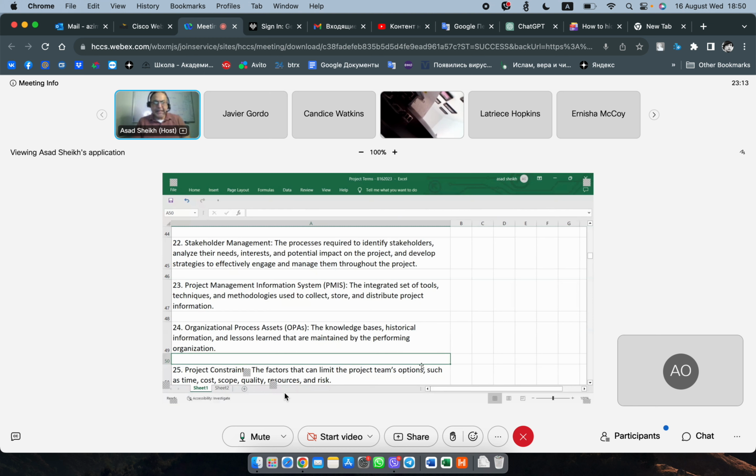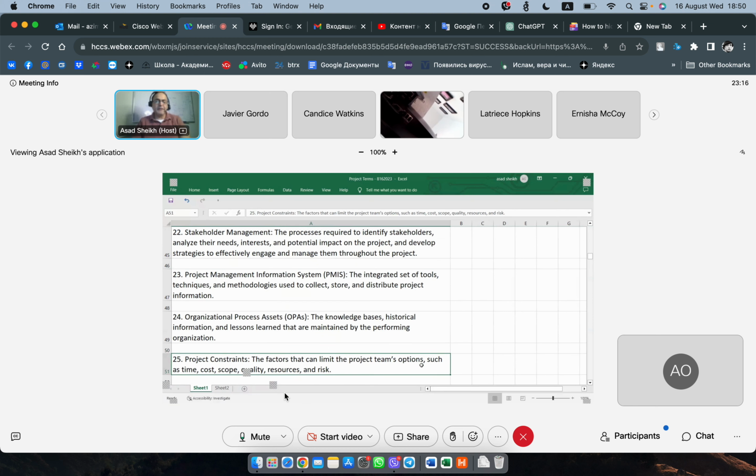All right. Organization process assets. This used to be in PMBOK 6. They would call all of these assets, for example, your lessons learned, your plans from other projects, all the documentation, all the archive documentation, all of those things constitute what they call organizational process assets, OPA. You may not get a question asking you about OPAs, but you will get a question about, what do you do with these documents? These are your assets, these are documents, and you use those documents to plan to move forward.